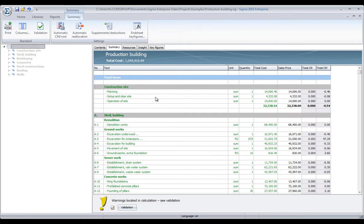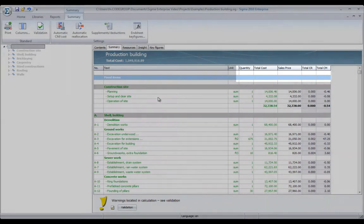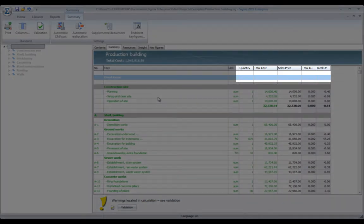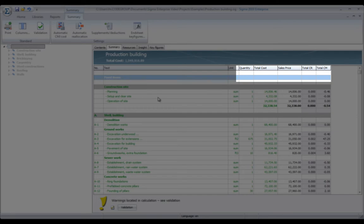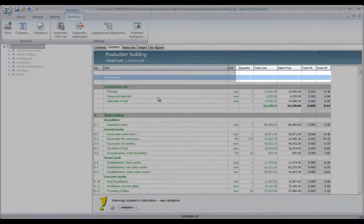On this page, you will find a complete overview of the entire estimation. You see the first two levels, the unit quantities, the total cost price, and the total sales price. The difference between them is the margins.